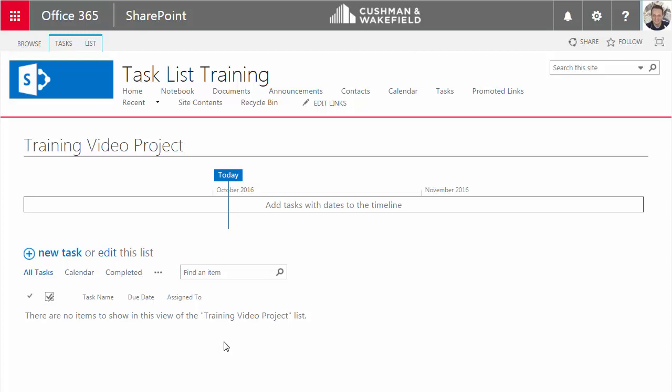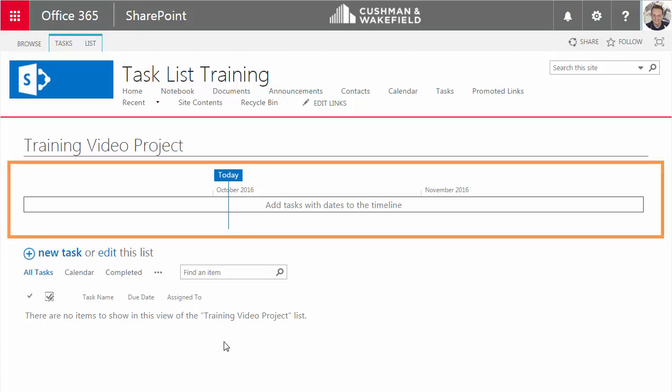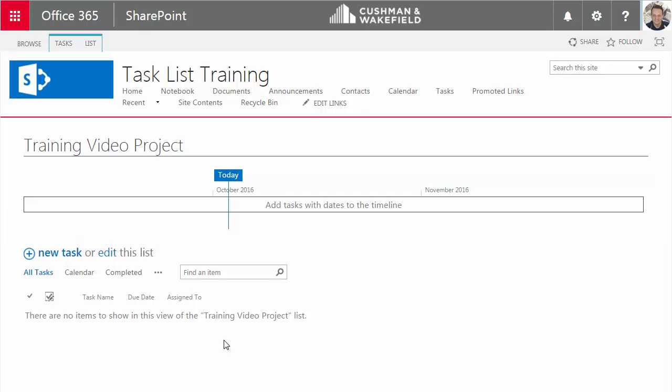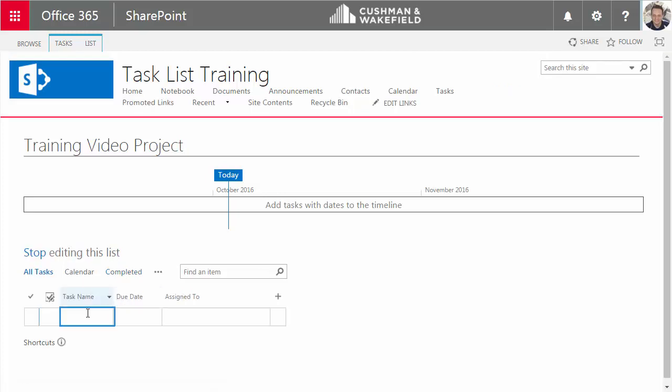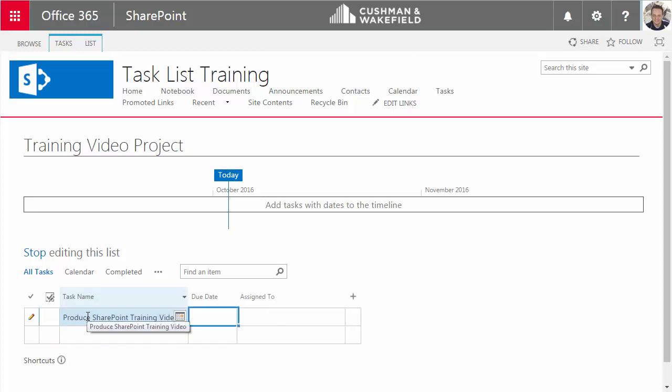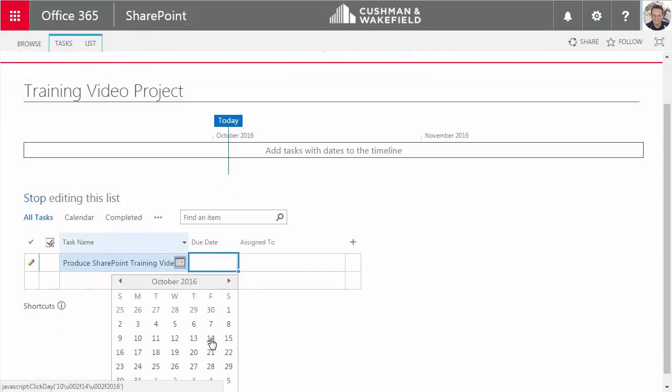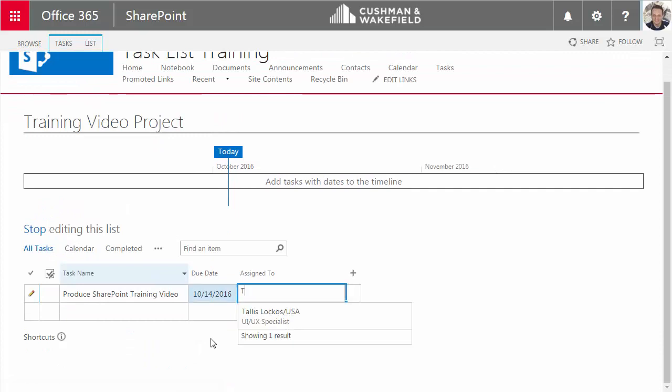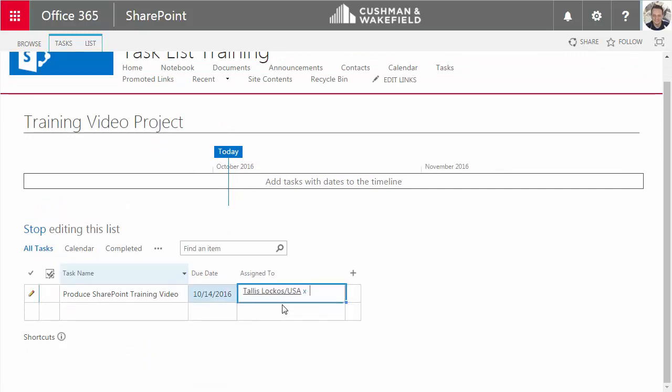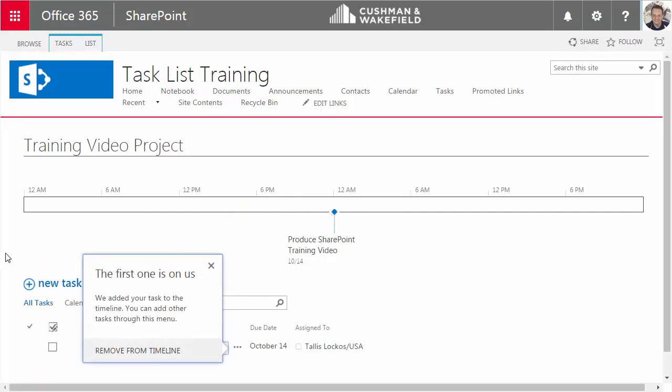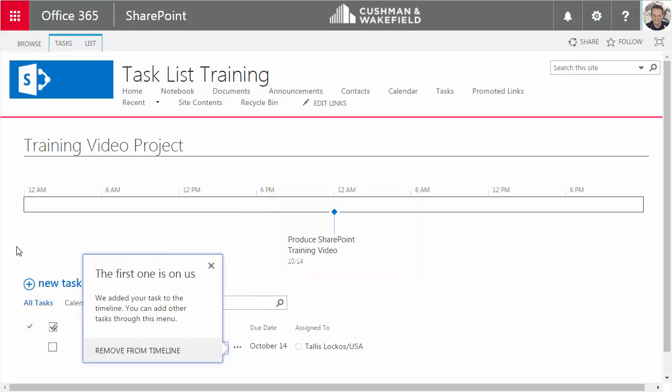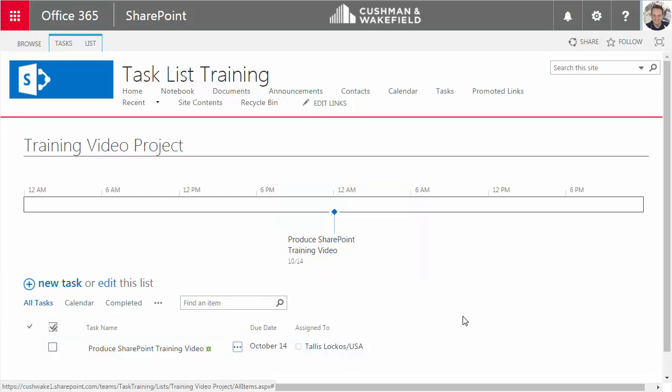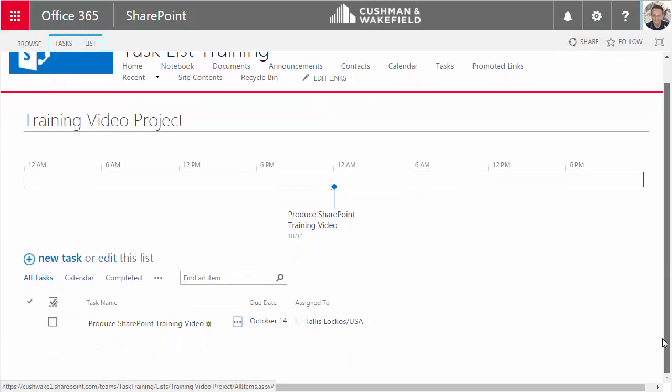This task list app puts a timeline at the top of the list. Later, I'll show you how to hide the timeline if you want. First, let's enter a summary task. There's a couple of ways to do that. One way is just click on Edit this list. That turns the list into a grid that I can edit directly. Enter the task name, and I can tab to the next field and enter a due date. I'll tab to the next column and assign this task to me. Then when I click Stop Editing, you can see that SharePoint threw this task up on the timeline for you. Now, SharePoint does that for the first task only. For tasks after that, you have to put them on the timeline yourself, and I'll show you how to do that in just a minute.